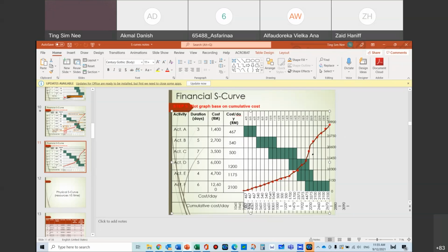That is a part where you may get loans from the bank, or you may get investment from other shareholders or other people who want to invest in your project. How much do you need to get? You cannot simply tell your shareholders, hey, this is a 20 million project, you give me 20 million. No such thing, correct? You will need to come up with the figure that you need your investor to invest, or the bank loans you need to get yourself through this month by month.